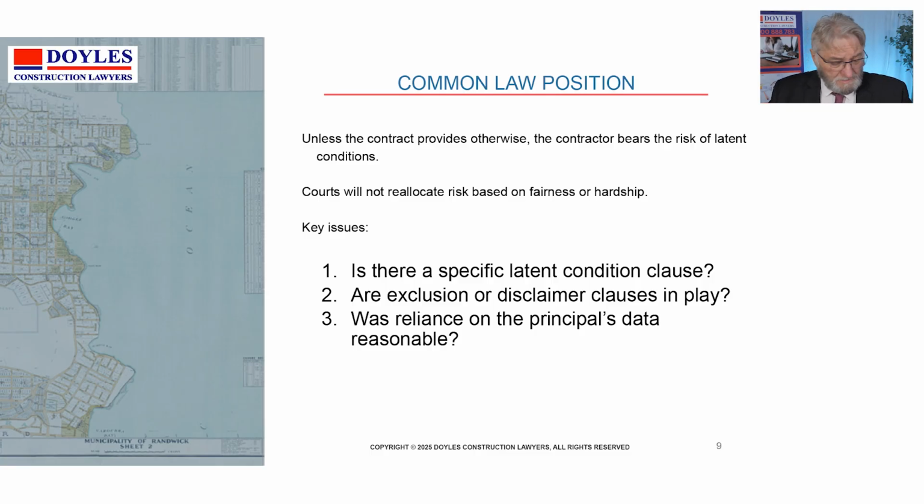Again, another matter I came across: somebody does some geotech, they want to organise it a long way ahead of time, and they rush through it and get some results out, and the geotech says the value will be X. It's designed on that basis under a harsh contract and eventually collapses. That's because wrong geotech information fundamentally was provided. So again, it's very important as a contractor, unless you're a D-Tech as well, and even if you are, to make sure that you're making your price contingent on the information that's being provided to you.